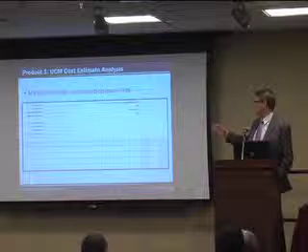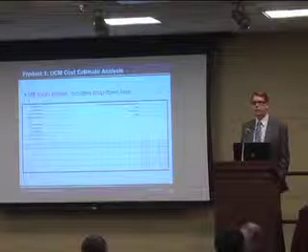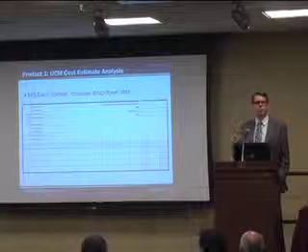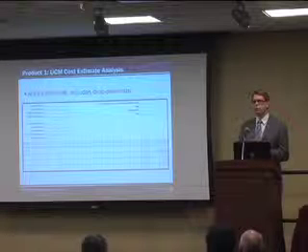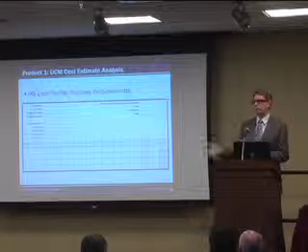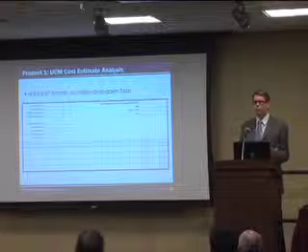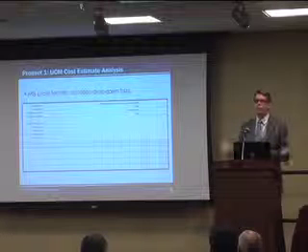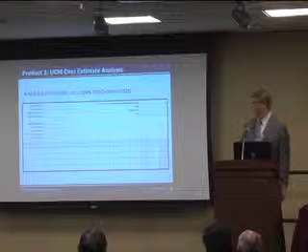So we added another spreadsheet that links to the first one, where you can keep track of the cost estimates in more detail. You can have different alternatives on how to deal with the conflict and keep track of those different cost estimates, and then in the end, what you have is some documentation on how you have dealt with a specific conflict. So if anybody ever goes back and says, why did you move that line out of the way, you can answer: well, we did some analysis, we figured out that was the most cost-effective way, and we involved the utilities. That's really a good and positive way to deal with it if anybody ever asks any questions.